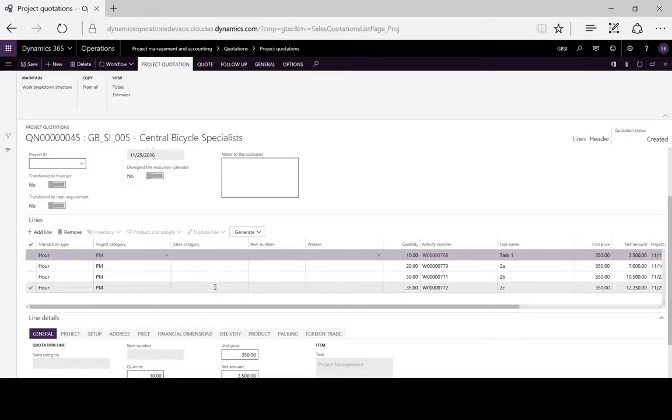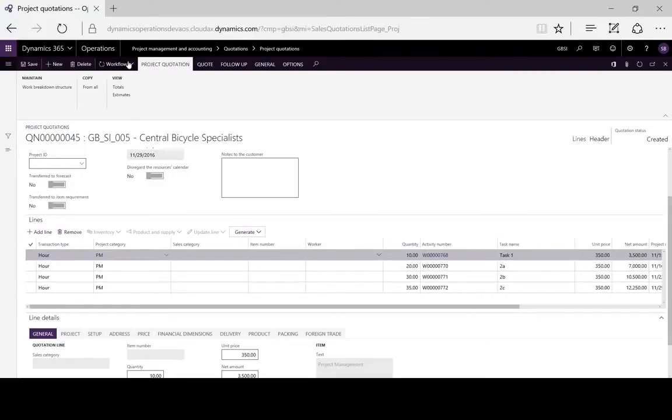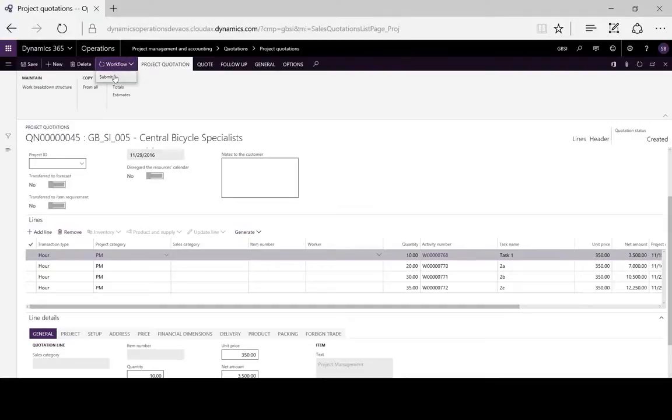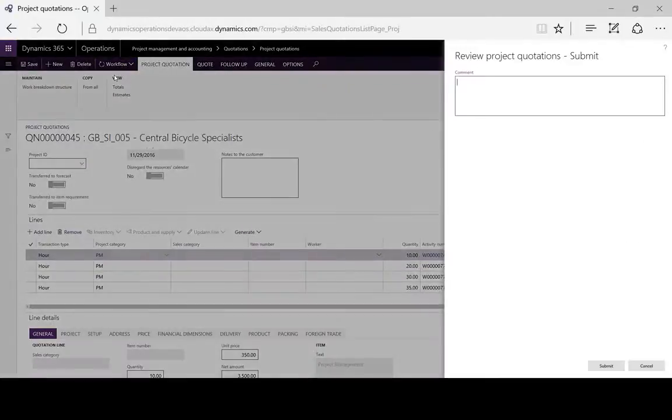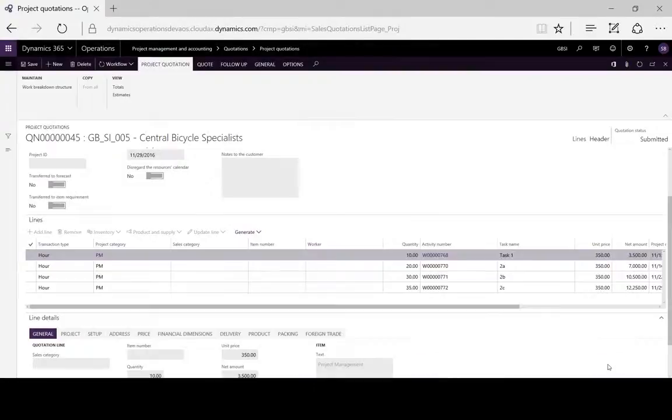Here we can add and amend as necessary. When our quotation is ready, we can submit this to the workflow, adding any necessary comments, and we wait for that to be processed and approved.